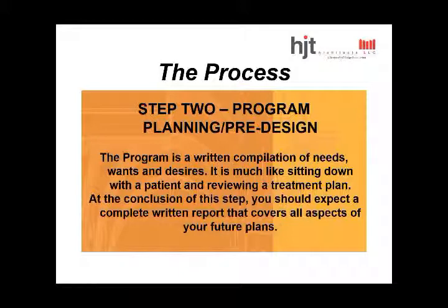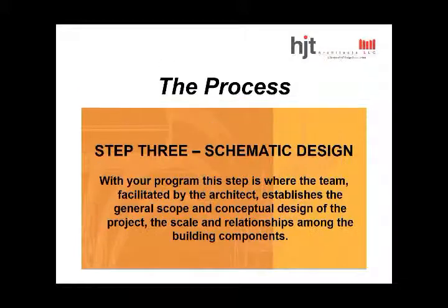Step three in the process is schematic design. That's a terminology that we in the architectural profession utilize. Basically, we take your program, and we as the team facilitate and establish the general scope and the conceptual design of the project, to scale, showing the relationship among all the building components.